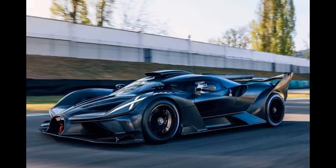Prioritized deliverables. Based on discussions, LJRC prioritizes upgrades to stay within the $75,000 budget per car. Car number 22: engine performance package, confirmed. Aerodynamic package, confirmed. Car number 43: aerodynamic package, confirmed. They propose additional high-visibility branding options for Apex on car number 43, for example, hood scoop decals and rear wing end plates, at no additional cost. Detailed cost tracking: LJRC implements project management software to track expenses against the budget throughout the upgrade process. They regularly review spending and communicate any minor variances to Apex, ensuring transparency.